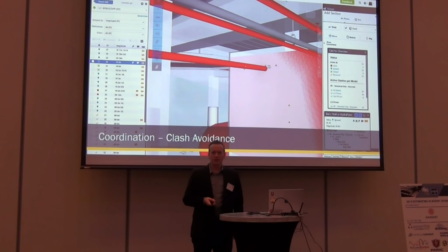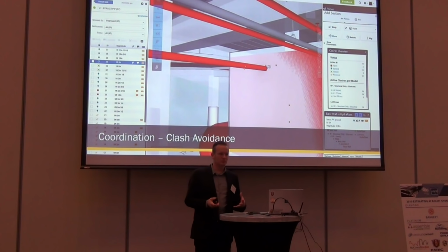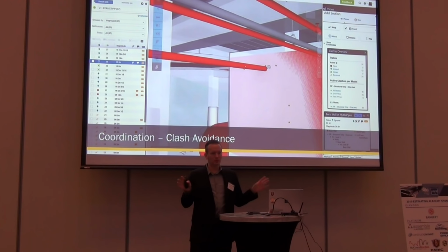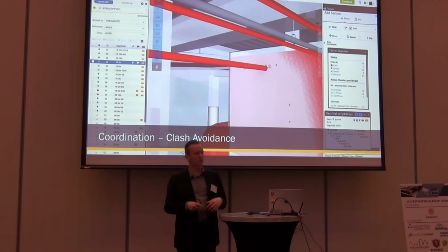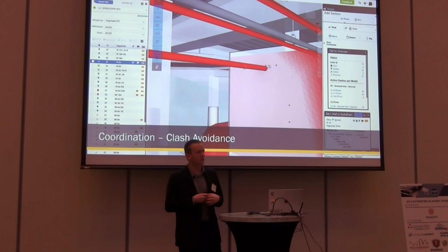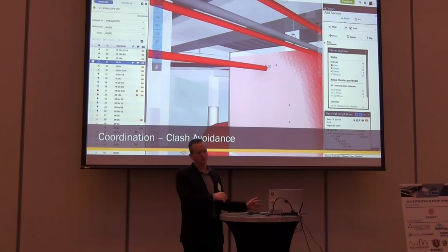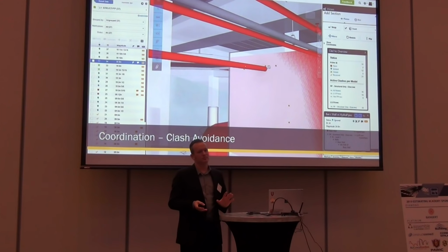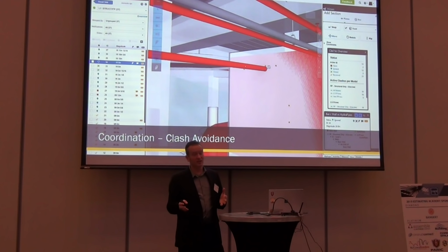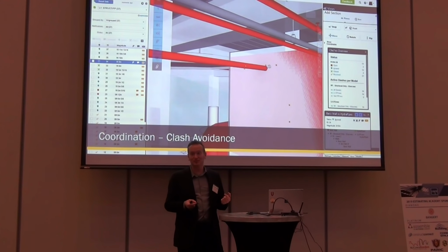If you're doing prefab on a project that's a stick-built type of product, wood stud, metal stud, something like that, thousands of little columns, right? You're trying to coordinate where all these standpipes are going to go, where all your conduits are going to be, things like that. If they're not modeled, you can't do that very effectively. If you're not doing that very effectively, what's that do to your estimate, right? Because if we design it wrong, and then it has to be redesigned again, then guess who's going to have to update the estimate? You guys.